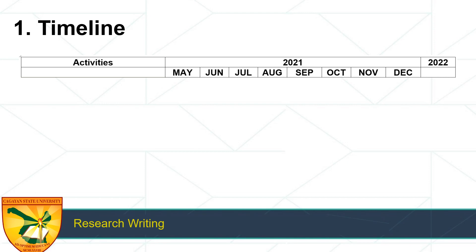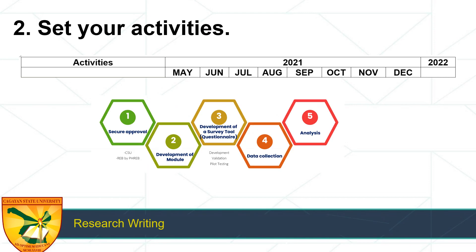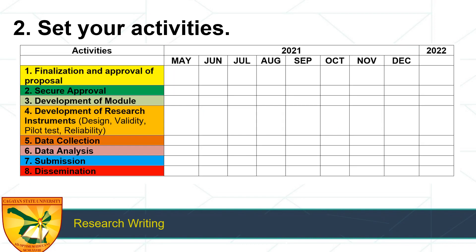You simply start with this format — you have the activities that you will be doing and your timeline. The timeline can be as specific as weeks or days, but usually I put it in months for a Gantt chart. Then second, set your activities. You will see your major activities in your data gathering procedure or the flowchart you've already done. I have here five major activities, and you just plot them out in the activities section.